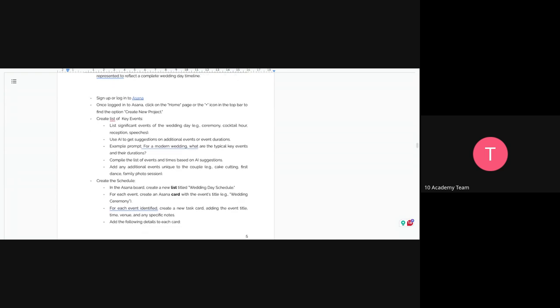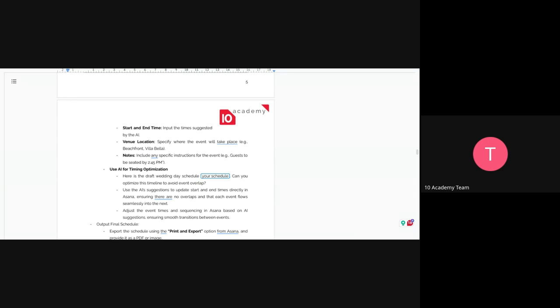You have to schedule five to seven key events. You're going to create a list of events and a schedule for each one. You're going to create a board and create a new list called a 'wedding day schedule.' For each event, you create an Asana card — for instance, for the wedding ceremony, you create a schedule with a start date and end date, and a venue location, such as whether it's on the beachfront, a villa, and so on.